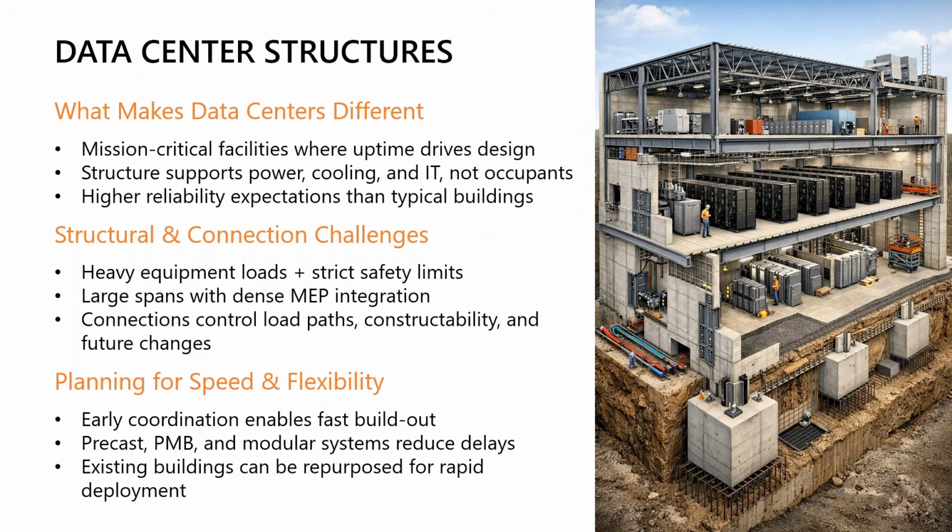Using precast systems, pre-manufactured buildings, and modular construction approaches are commonly used here in data centers, specifically because they reduce the delays on such fast-track projects. We have also seen that repurposing of existing buildings is increasingly common due to the demand and schedule pressure that these businesses face. This method, however, will require extensive knowledge of the existing load paths to be able to reuse